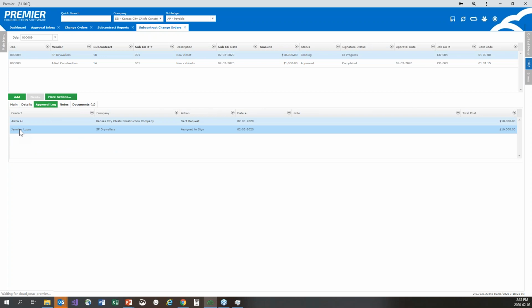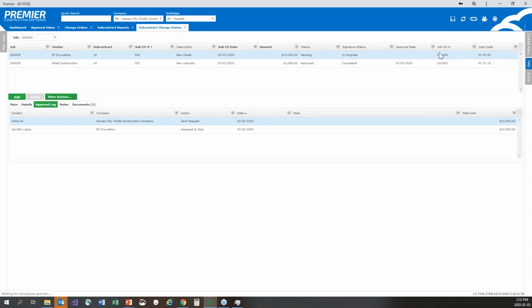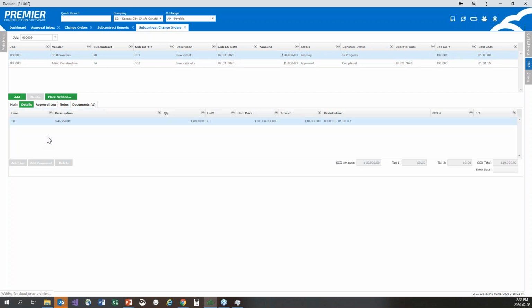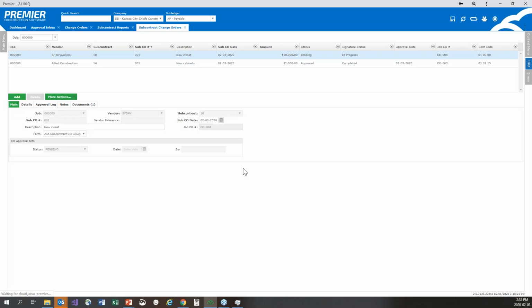It is her subcontract. Once she signs it, the same thing as what happened to the subcontract will happen here. My commitment gets recorded. My job costs get updated. It is linked to the correct change order. Everything has come through from that original change order: my description, my specs, all of that. Pretty awesome. I'm going to open up the floor to questions before I get into the setup again. Are there any questions?